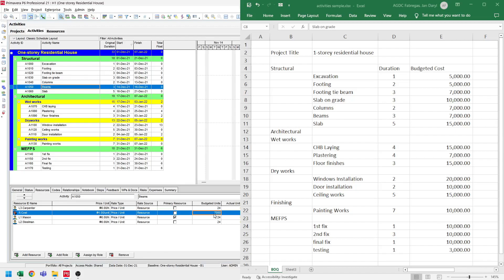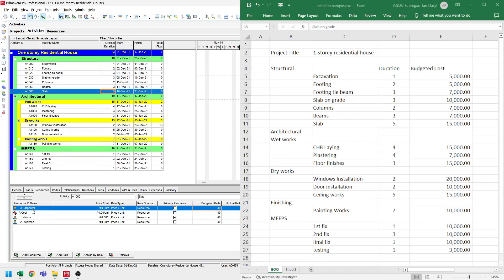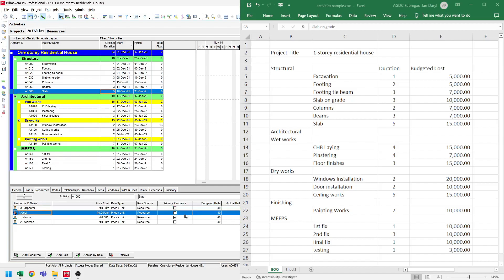For the slab, we have $15,000. So let's select the activity and set the budgeted units to $15,000. That's basically how we incorporate costs on the activities by resource assignment — we assign a material resource on these activities, set the price per unit to $1, and then adjust the cost through the budgeted units.